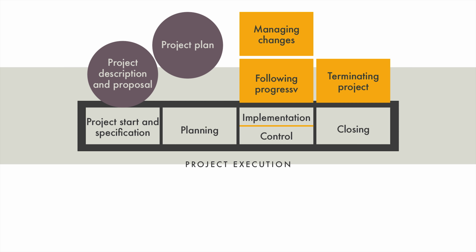Making changes during project implementation often involves very significant risks, and on the other hand, also significant business opportunities. It is therefore important that the proposed changes are systematically processed and their positive and negative effects are assessed, and only then the decision to approve or reject the change is taken. Finally, the decisions are documented and then carried out.